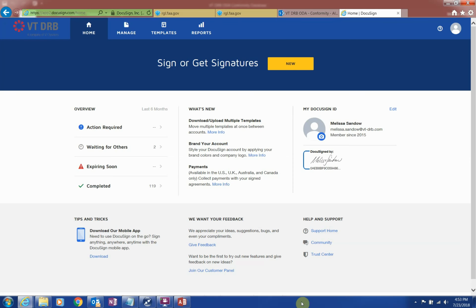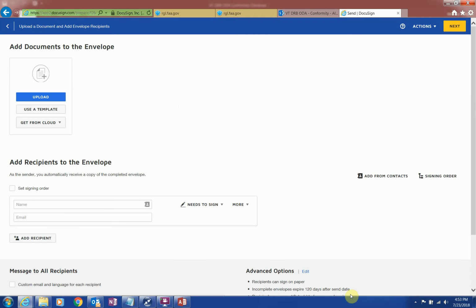RFCs can be generated from the database and sent out via DocuSign for the review process. Make sure to include the IUM to receive a copy of the final signed version, as that is what initiates his ability to start an inspection.